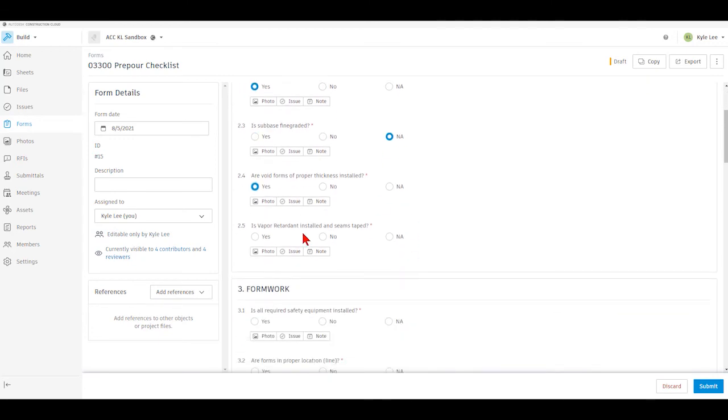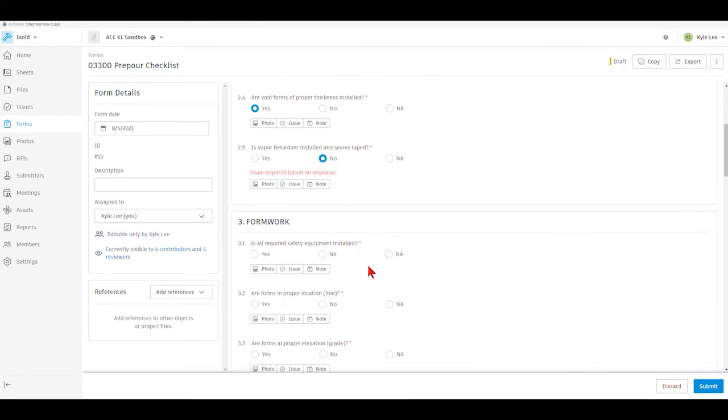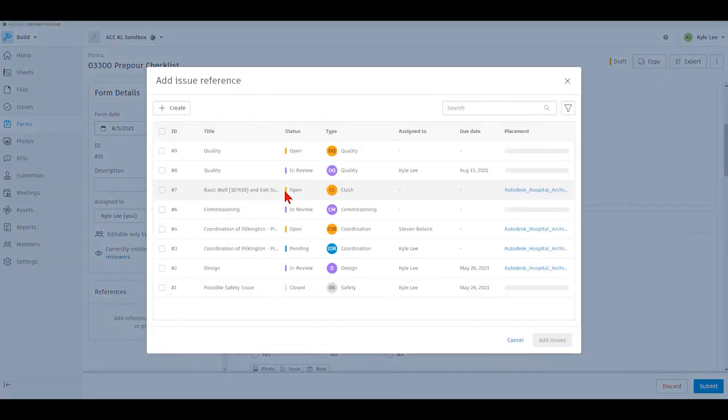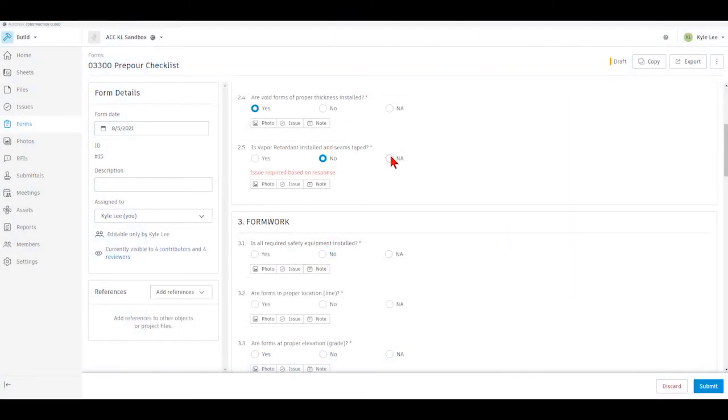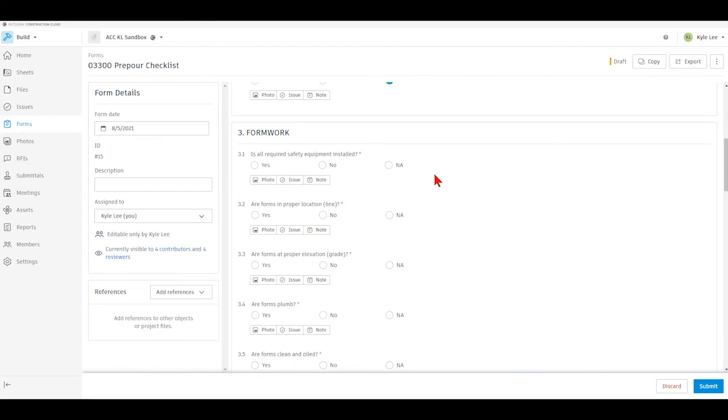So again, we would just work down through our list here. Now, if this was a checklist that had multiple people that would be contributing to it, then we could complete this. Now, I've entered a non-conforming answer, so I would need to create an issue as a part of that if it's a non-conforming answer. And so it does call that out, and I could just click that issue and create a new issue that would then be referenced back to this form here.